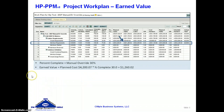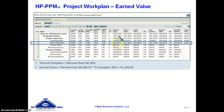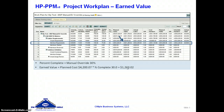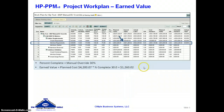Our first element is called earned value. It equals the total planned cost — which in this case is $4,200.07, and can include both labor and non-labor costs in the baseline — times our percent complete of 30%. This says that if we were rolling along doing the same number of hours all the time, we should have actually consumed $1,260 already. So that's our earned value.